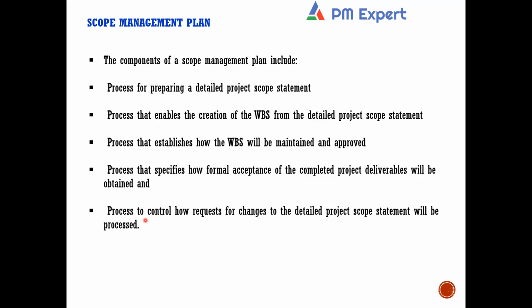Can I say this scope management plan is a kind of rules of the game for scope? Any process to be followed related to scope is defined in this plan, though it doesn't contain scope at all. It is a process for managing the scope. Scope is contained in the scope statement. If I ask in which document you define the format of the scope statement, it is the process for preparing a detailed project scope statement.